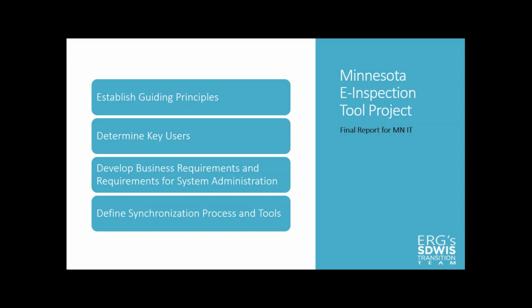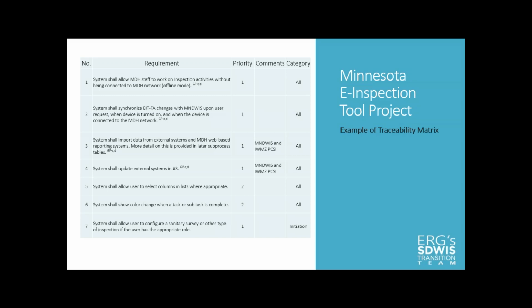We also went down quite deeply into the business requirements, and I'm going to show you just a quick frame of what we put in the final document. Actually, I'll just pull that up now. So here's an example of an overarching list of things that would be needed. I'm not going to read through them, but the idea is that we would create a wish list of the things that were essential to these different user groups, and we would assign them priorities. They would be in plain English: the must have, should have, and would love to have, wish we could have.